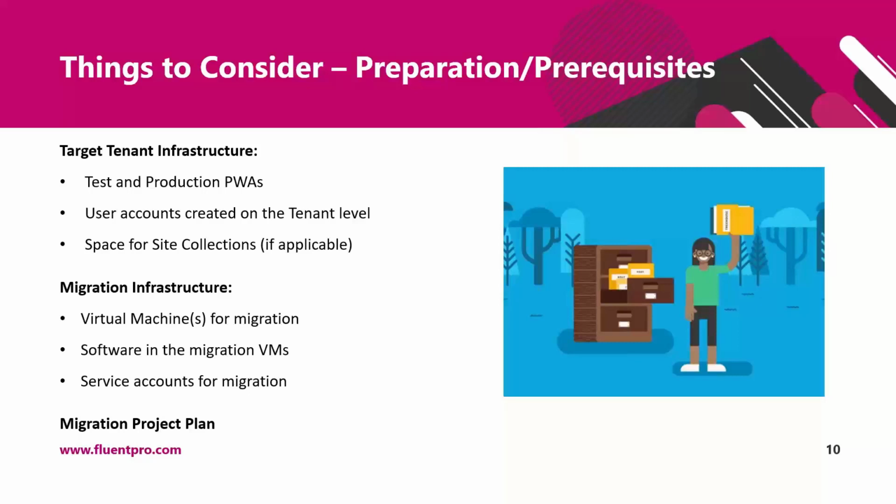Also, it's more for Project Online, but space for site collections. We recommend to set it as double the size of the site collections in the source Project Online in order to accommodate all the migrated data, and new data that will be added after users switch to the new environment.